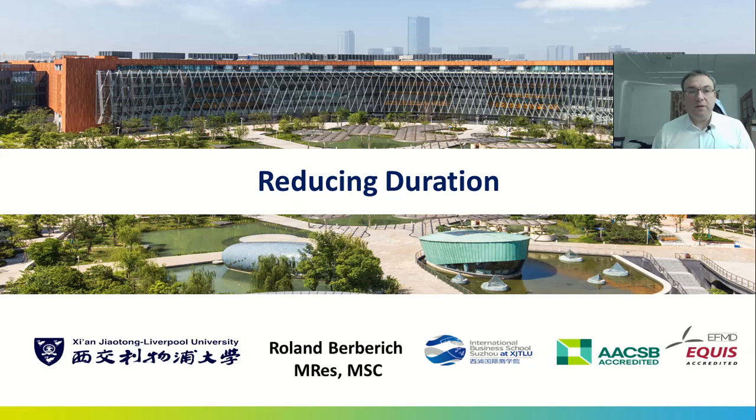Now, first of all, why would you want to do that, reducing the duration of the project? The two main reasons that we've discussed: first of all, you want to catch up with the project because there have been delays throughout the whole course of the project. And reducing the duration of the remaining activities would then get the project back on track and into the timeline.